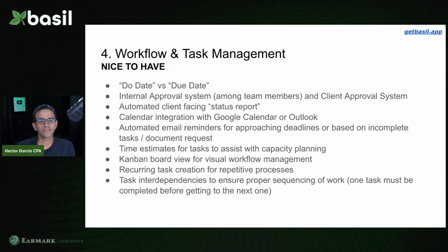Time estimates for tasks. If you're able to set up in your settings that reconciling a bank account takes an hour, adjusting the balance sheet takes 30 minutes, and revising last year's tax return takes 30 minutes, or whatever, you create a template of how long things generally take. Then when you create a full project with a bunch of tasks, the system tells you,